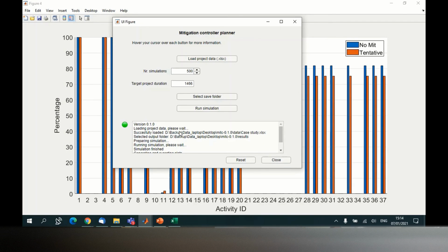So, Richie, do you have a network planning that you can use? Did you obtain one? Do you mean the MS Project file, the planning file? Yeah, I have that, but I still need to think about the risk and the mitigation. Of course, you can make some assumptions here. In an ideal situation, you ask your project manager what mitigations he had to apply, or what went wrong, and from that you can derive the mitigations that were applied. You can also use common sense and think of mitigations that would be applicable to your project. So you have some leeway here.